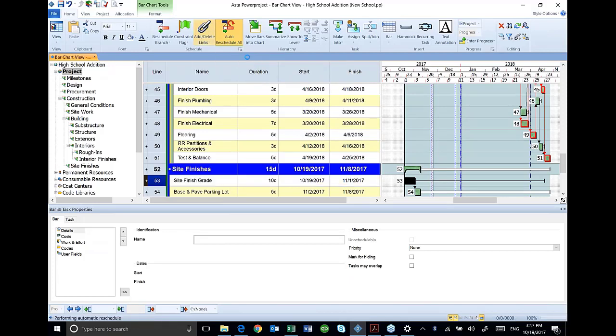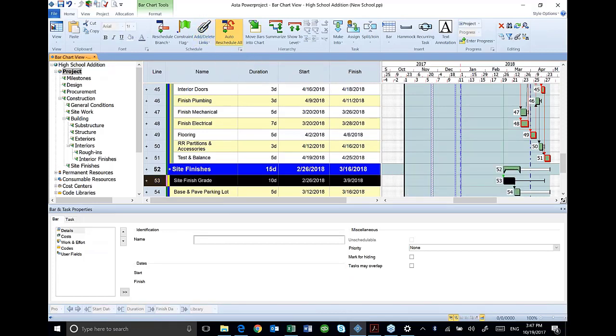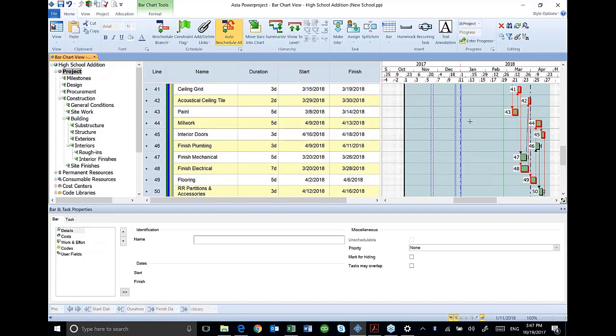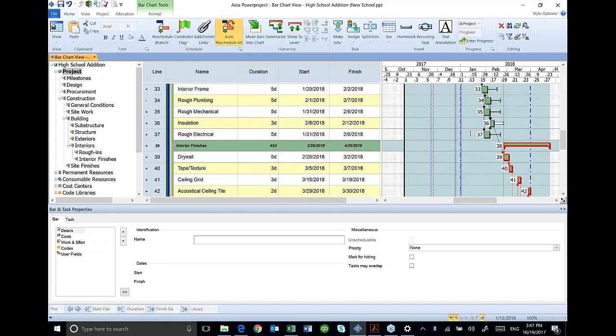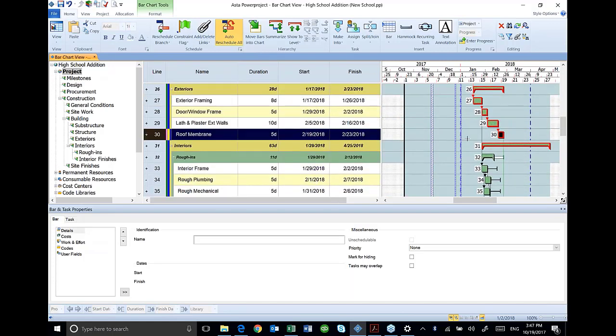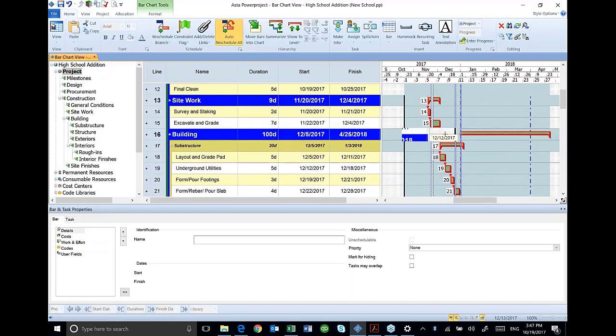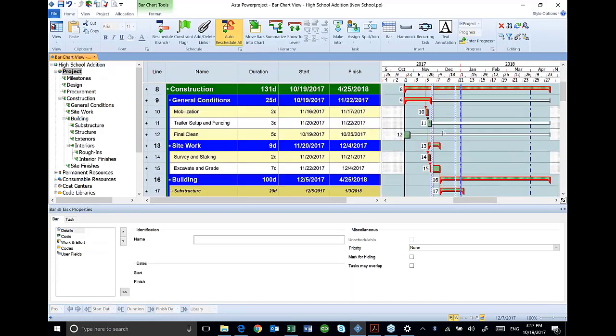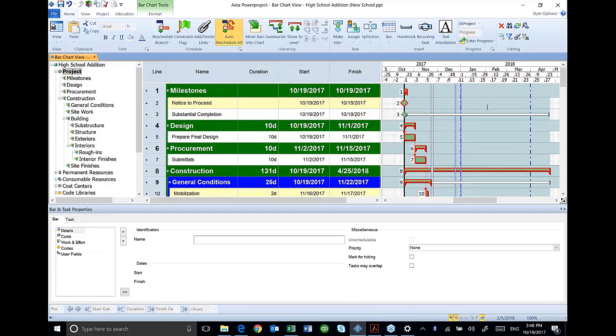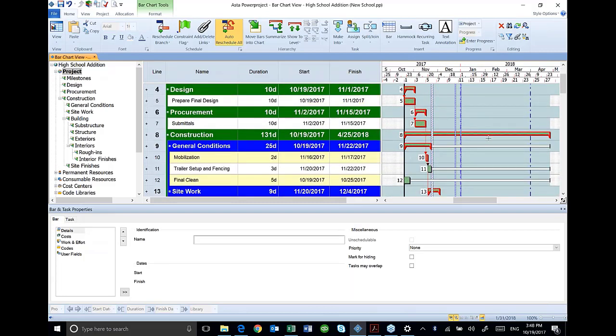I can also hit Control F2 to link tasks. So that's the second step. My first step was going through and tying all the activities in a group, in the individual groups. Second step is going in and making sure each group has an activity that's kicking the work off. What's the predecessor for each group? And then finally, I go in and say, make sure everything has an ending activity.